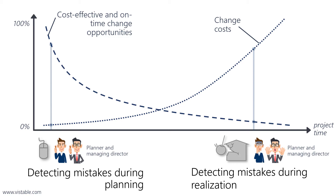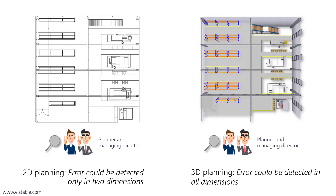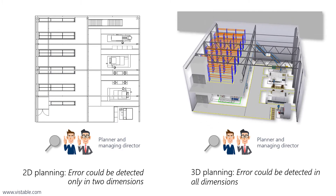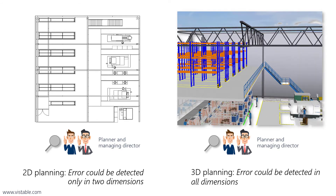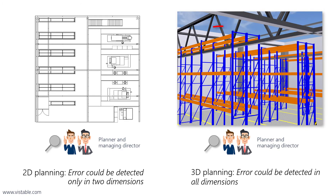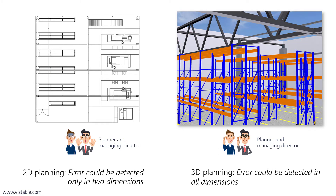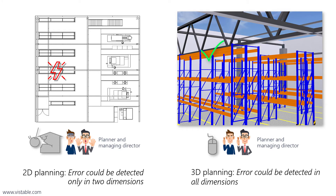Follow-up costs due to schedule delays can be even higher. That is why it is very important to identify or avoid possible errors as early as possible. A three-dimensional model is much closer to reality than a two-dimensional model, which is why errors in 3D planning can be detected and corrected earlier. This reduces costs and shortens implementation times. Therefore 3D planning offers great advantages over 2D planning in terms of cost and on-time implementation. This is countered by the rumor that 3D planning is costly and complicated.